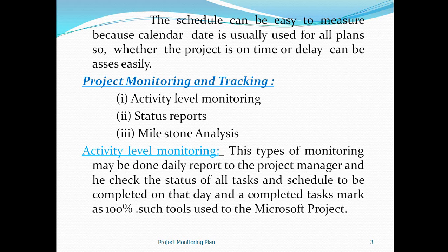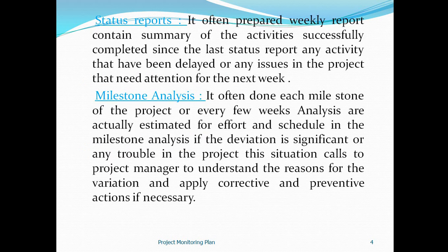It checks the status of all tasks. If it is completed, it will be marked as 100%. If it is incomplete, it will be marked based on the completed work. That will continue on the next day.